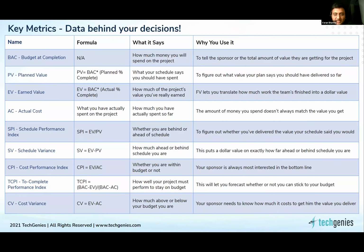One person working on a project in Peru and another person working on a project in Lebanon. So having capacity planning done and maintaining resource utilization metrics would be a help to the delivery management practice, so we can take decisions on what percentage we can involve that resource in. And I would say, not having a project manager or delivery manager on a global project is kind of like playing Russian roulette. You may get what you asked for, but there's that much more that could go wrong.